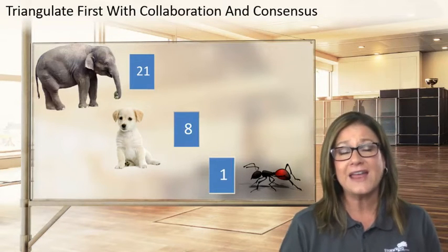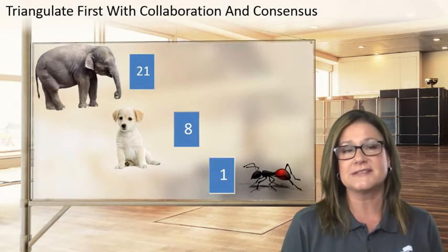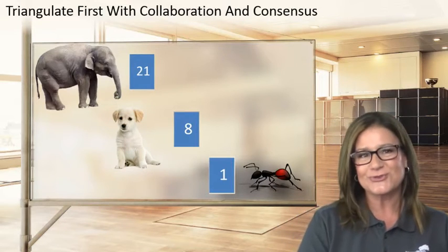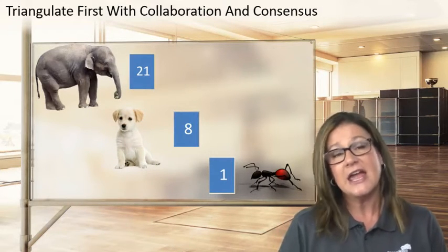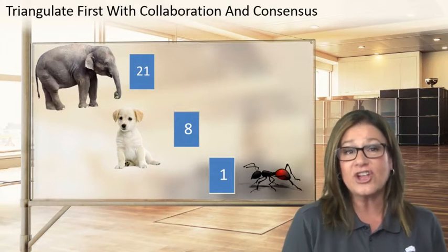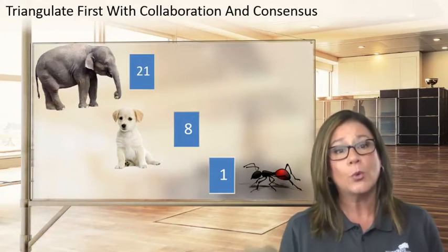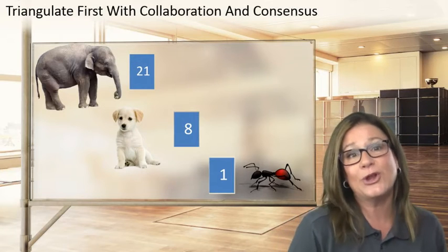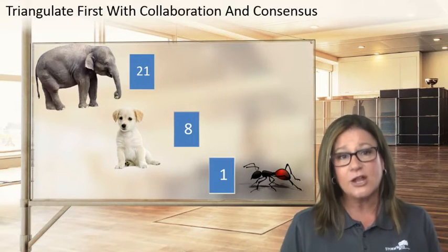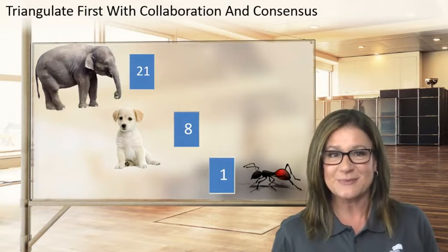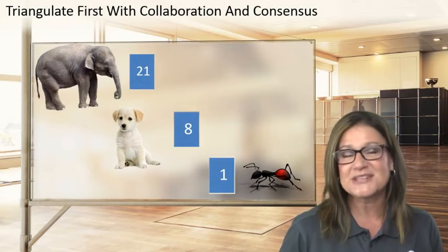And so if we apply that to the amount of work that needs to be accomplished based on the user story or scope of work, then we can really get an idea of what the triangulation is. Now, every other piece of work that we look at, we know what the maximum is, we know what the middle is, and we know what the lowest is. Now, everything else that we look at, we can use that scalable model in order to estimate work. So let's play poker.